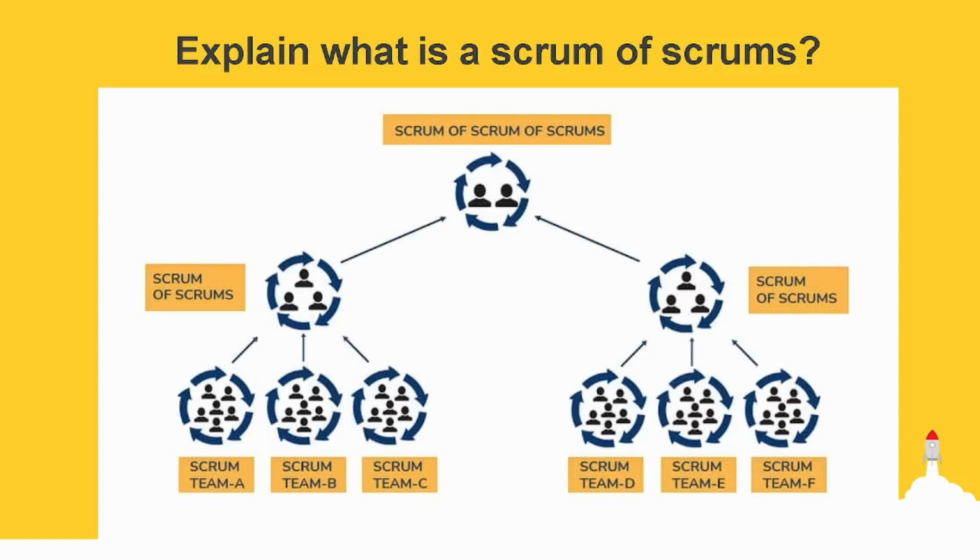Ideally, it should follow the various teams' daily stand-ups so that the latest information is communicated. While daily Scrum meetings are used for quick updates, not problem solving, the Scrum of Scrums is not bound by the same rule. If a problem is identified in the Scrum of Scrums and all parties needed to make a decision are in attendance, the issue can be addressed at the same time in the same meeting.